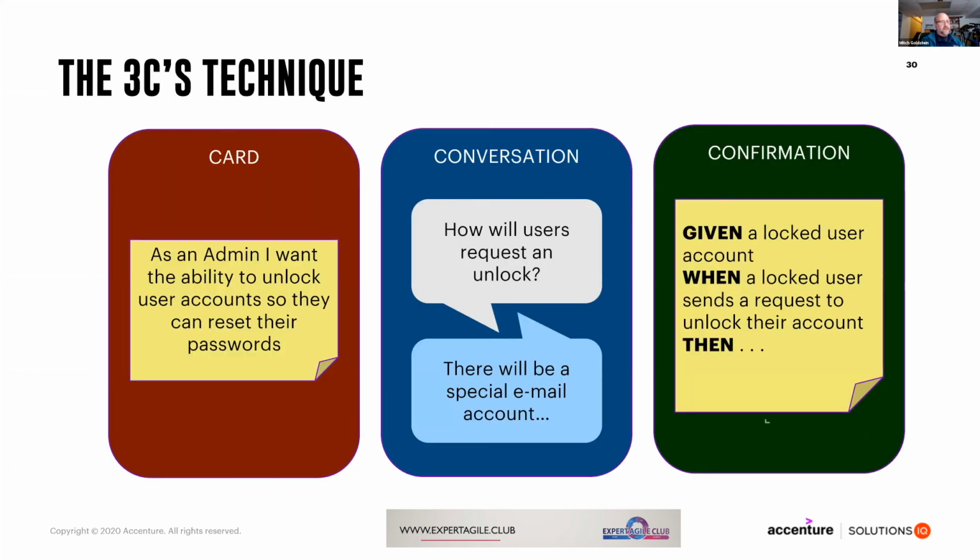And we use the 3 C's technique. This is also in a number of different methodologies. The 3 C's are card, conversation, and confirmation. And I find it especially amusing given our current situation of pandemic, where back in the good old days we would all get together and huddle somewhere in a conference room with a few stacks of sticky notes. I still have mine with me. Always handy, Sharpie, always handy. And we would do this on a board. We would put these cards up, and we would put whatever information we knew on the card and document it. And that becomes our larval, our nascent story.